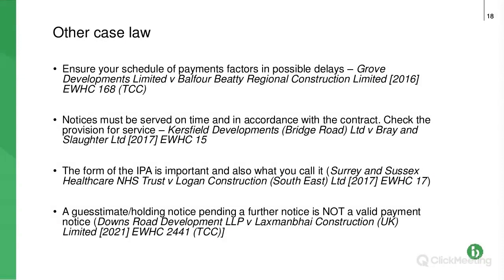This one had a schedule of payments which ended, as you'd expect, on the planned completion date in the contract. The difficulty was, as often happens, the project was delayed and went on. And what the court said was no. Balfour Beatty had no right to recover interim payment applications after that payment schedule had ended. So just be really careful about that, contractors and subcontractors.